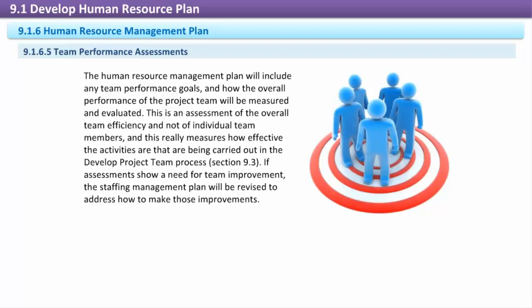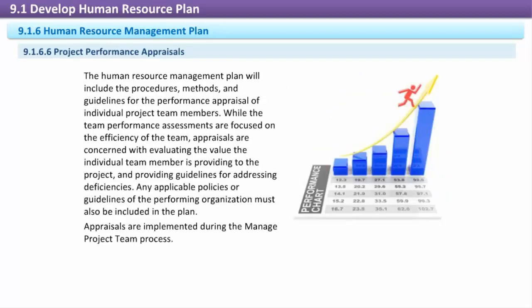Project Performance Appraisals: The Human Resource Management Plan will include the procedures, methods, and guidelines for the performance appraisal of individual project team members. While the team performance assessments are focused on the efficiency of a team, appraisals are concerned with evaluating the value the individual team member is providing to the project, and providing guidelines for addressing deficiencies. Any applicable policies or guidelines of the performing organization must also be included in the plan. Appraisals are implemented during the Manage Project Team process.